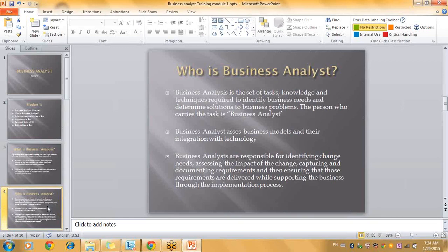We are going to need testing. So all this assessment, right? For this change, we need to go to testing. For testing, it requires this many hours. For changing, it requires this many hours. These are all what I am doing when assessing a change, the impact of change, right?